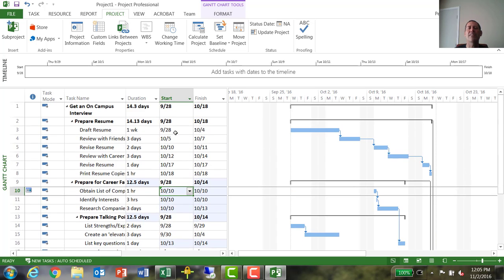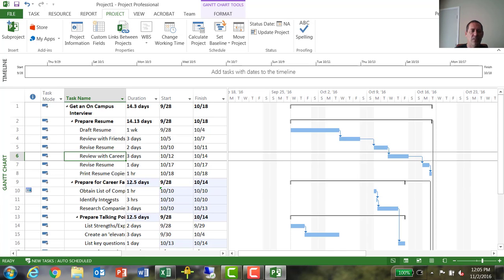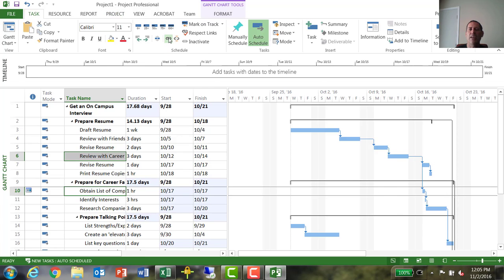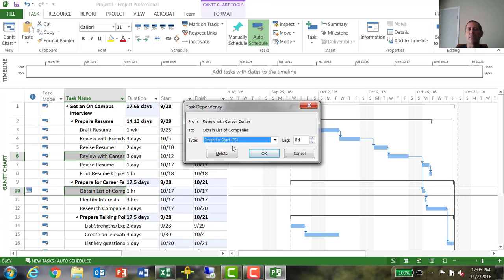If instead you wanted to say, well, I don't want to start getting my list of companies until after I have, or maybe I'm just going to do it when I go to the Career Center. If I do that, then review with Career Center and obtain list of companies. Those are now linked. Want to do that at the same time? That's fine. We go to task, we create a link. By default, that became a finish to start link, but it doesn't need to be. If I double tap it, that could easily be a start to start.